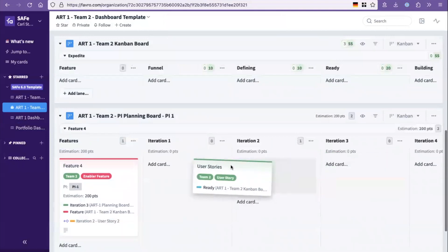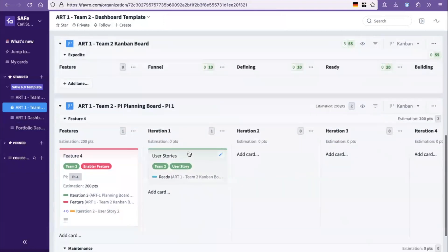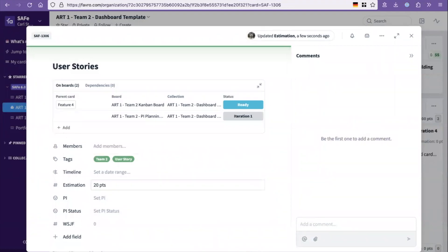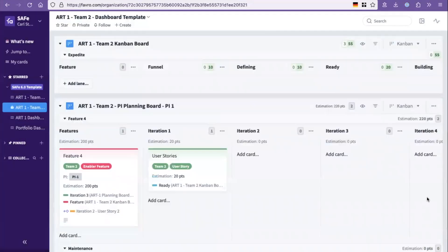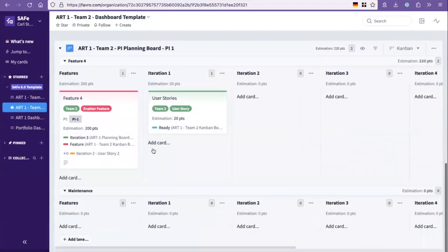The team then thinks through what iterations would we build this in? Well, this would probably be something we're building in iteration two. And from that, as you estimate it, you can then see your estimation for that iteration. So this provides the basics for the PI planning in Favro.